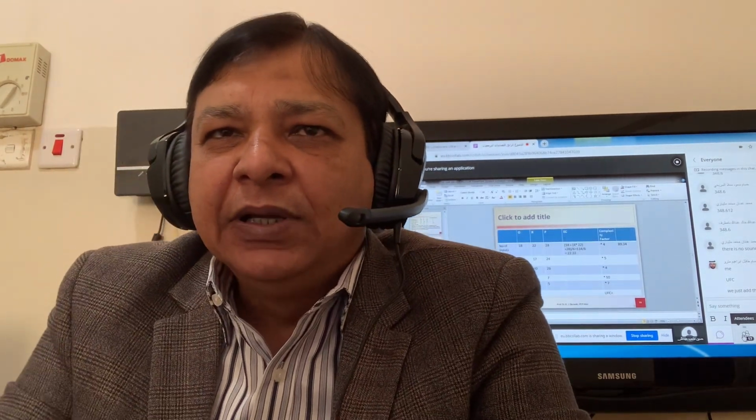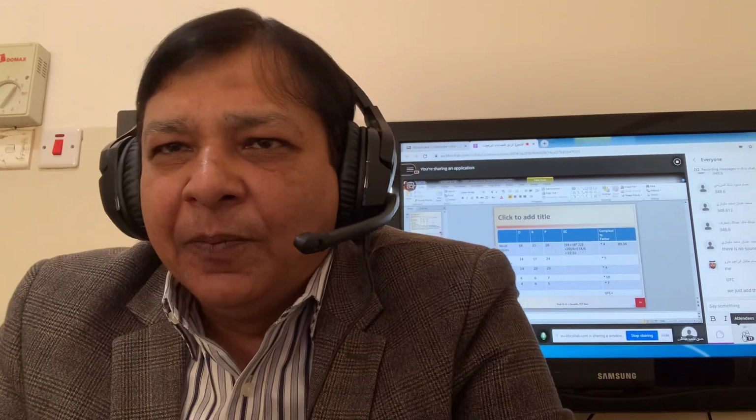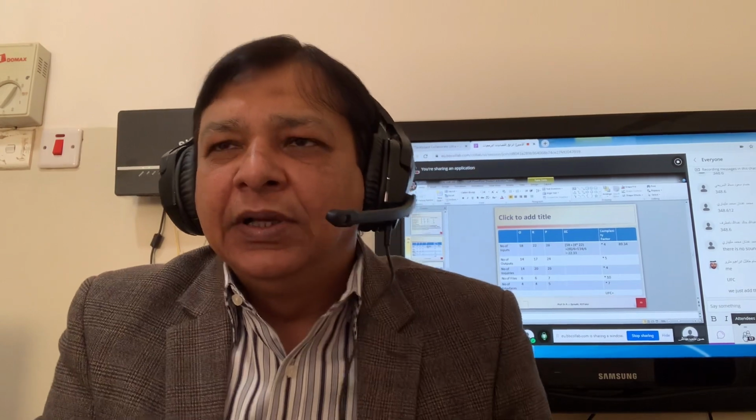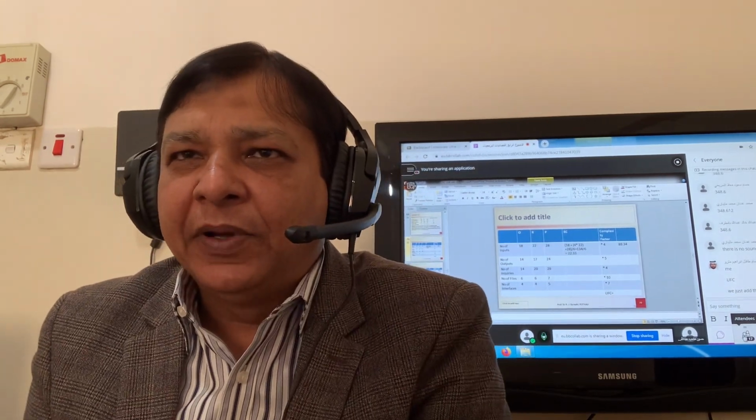The project manager will give you values. He has experience. From the requirements, he will tell you the optimistic, realistic, and pessimistic values for inputs, outputs, inquiries, files, and interfaces. Then you will apply the estimated count formula, O plus 4 into R plus P divided by 6. Then complexity factors are given according to the nature of the project: low complexity, average complexity, or high complexity. According to the complexity, you will select the complexity factor.